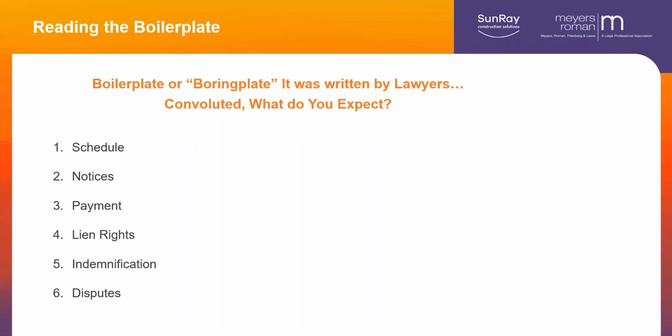Payment. How's payment going to work? One of the terms in payment we talked about, we brushed on, which is, is it a pay-if-paid clause? Now, I remember I said this, the payment concept has mixed in with it lien rights and things under the one statute, 41-1362. 41-1361 is its sister, which is the prompt pay law. In Ohio, it says they have to pay you within 10 days of the day they're paid. Now, it's more complicated than that, but essentially, they have to pay you within 10 days.